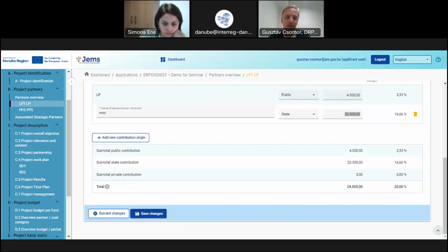So in case a private enterprise is involved, then we will need a thorough justification of what is that specific expertise and contribution that makes it necessary that that specific private entity is taken on board instead of being subcontracted, I mean, selected through a public procurement. I don't know if there is any more to add from your side. No, good.